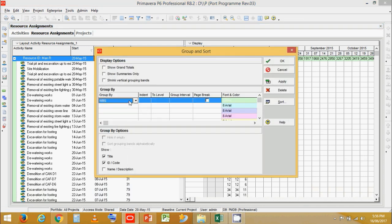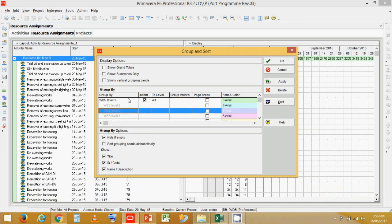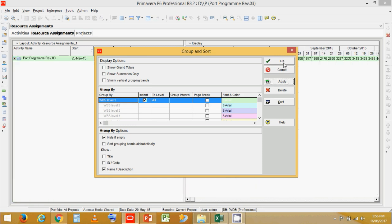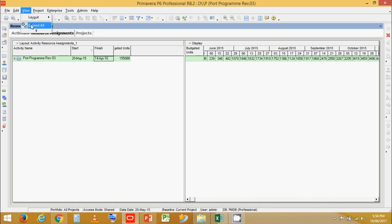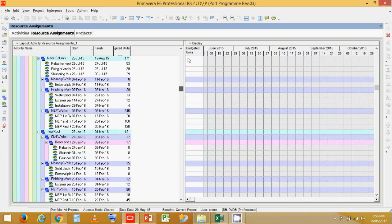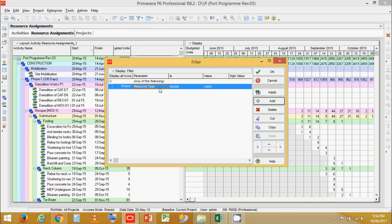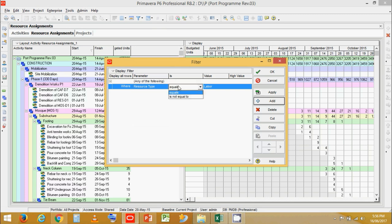Let's change the grouping to WBS and click Apply. Now expand all. You can see the project WBS. Let's go to Filter, click on Customize. Now this is an important filter you need to apply: Resource Type equals Labor.